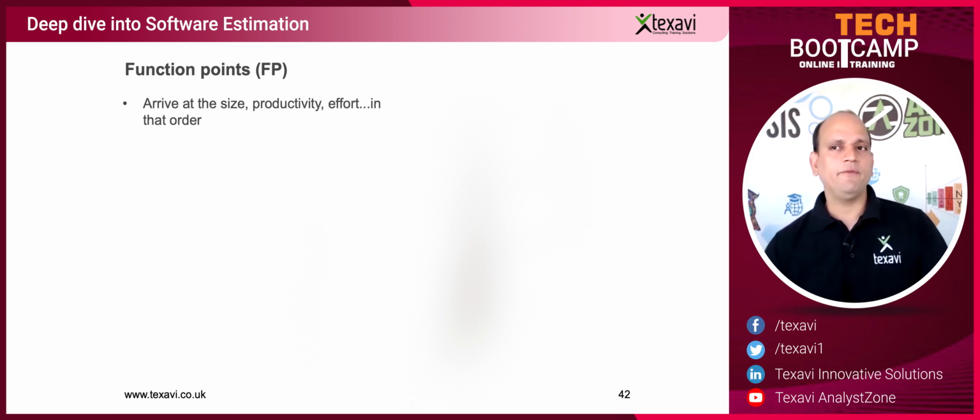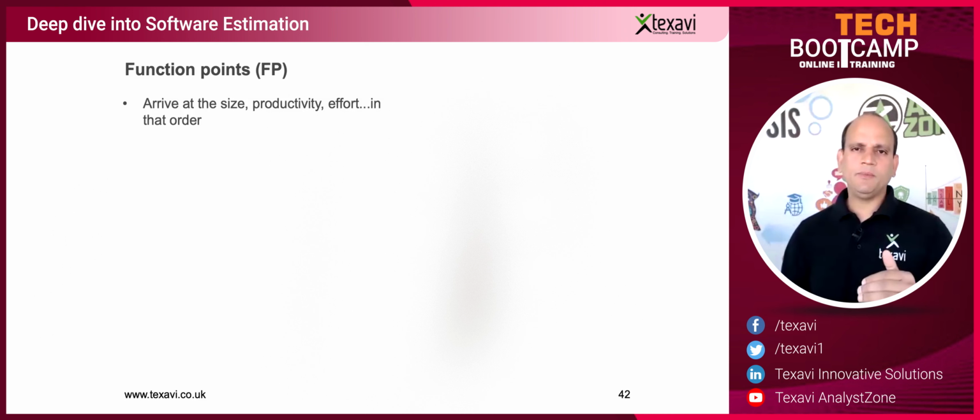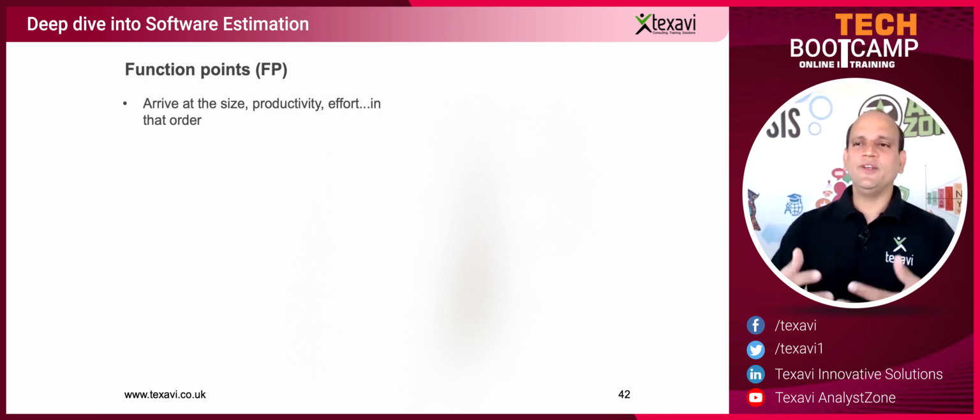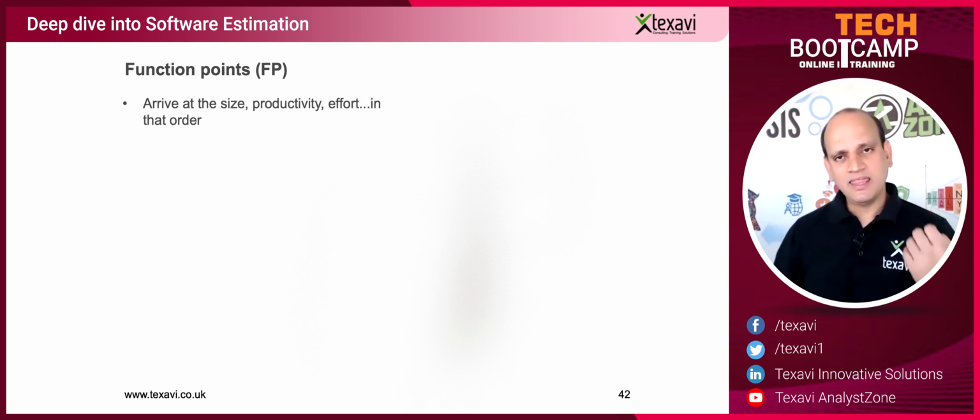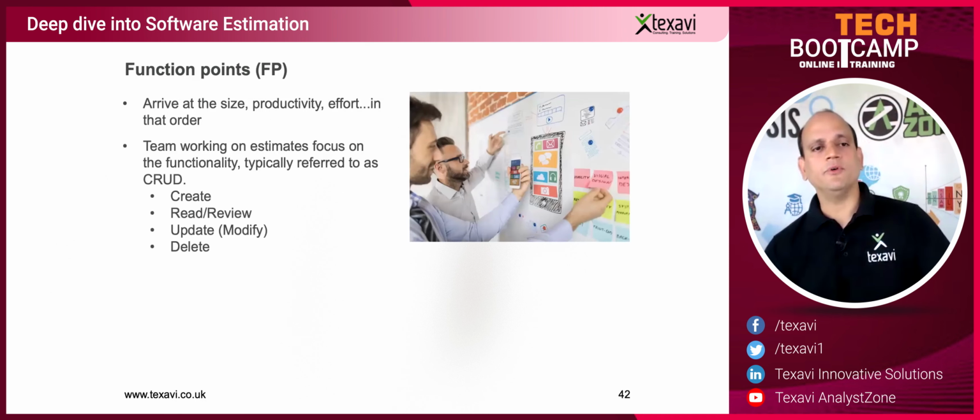So don't forget that whenever you talk about estimation, people jump into cost. Tell me how much time it would take. Tell me how much it would cost. These are good questions to ask, but you can't just start off there. You need to start somewhere else, and that is the size. Unless you understand the size of a particular piece of work, you cannot estimate how much time it would take, what is the effort involved, and what's the cost involved.